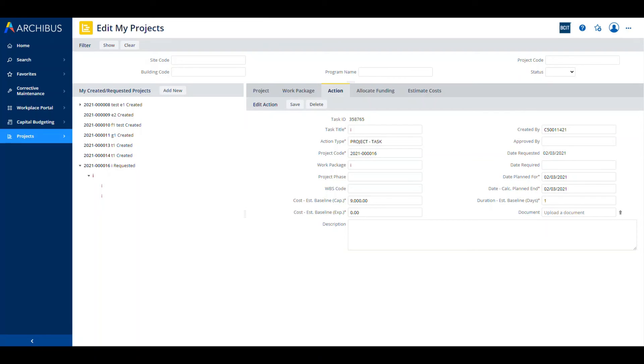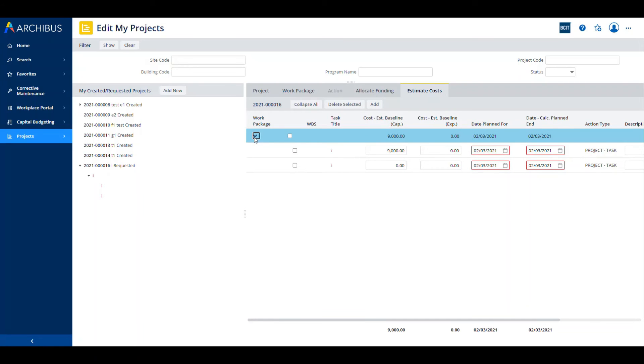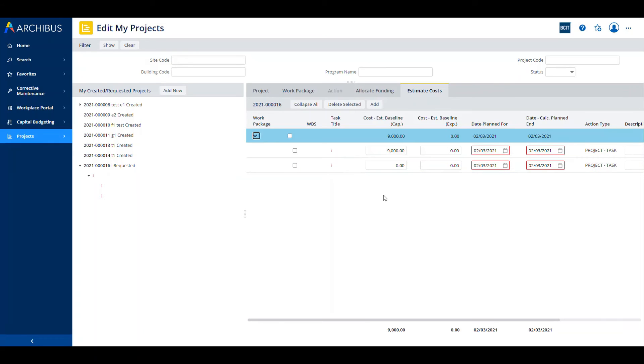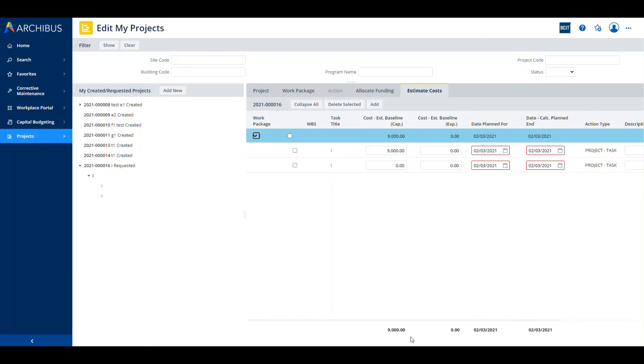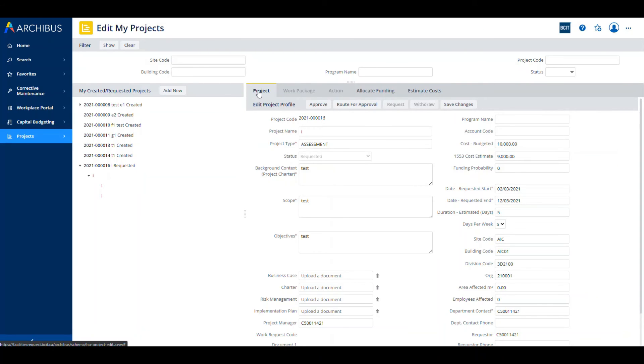The next step is to go over and look at the estimate costs. Allocate funding is not something that project managers are typically going to be involved with. Let's click on estimate cost and have a look at this screen. Right now you're going to see a work package with any tasks. We've got it at $9,000 for an estimate baseline here. You can make changes if you needed to. You can see a summary of your tasks within the work package. And if you had more than one work package, they would also show up here. So you would finish your estimate costs. And once you've finished your estimate costs, you go back to the project. And now you're ready to send that for approval.